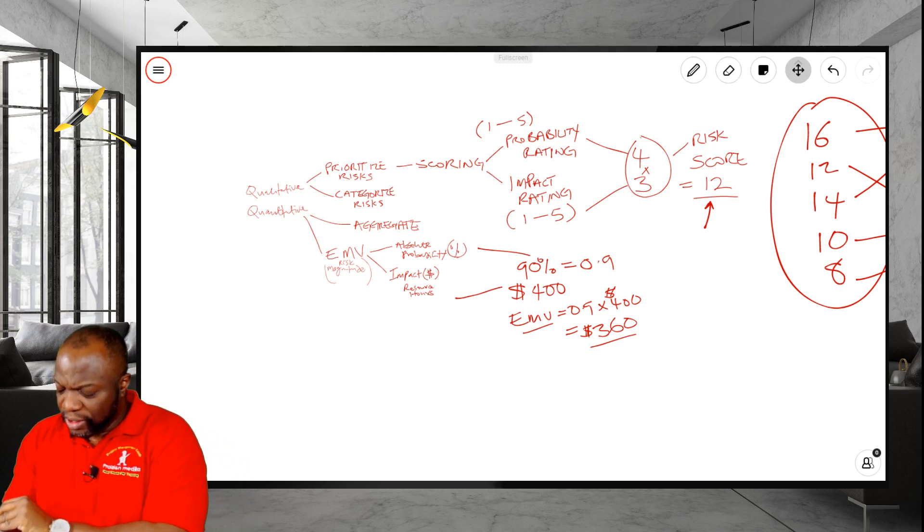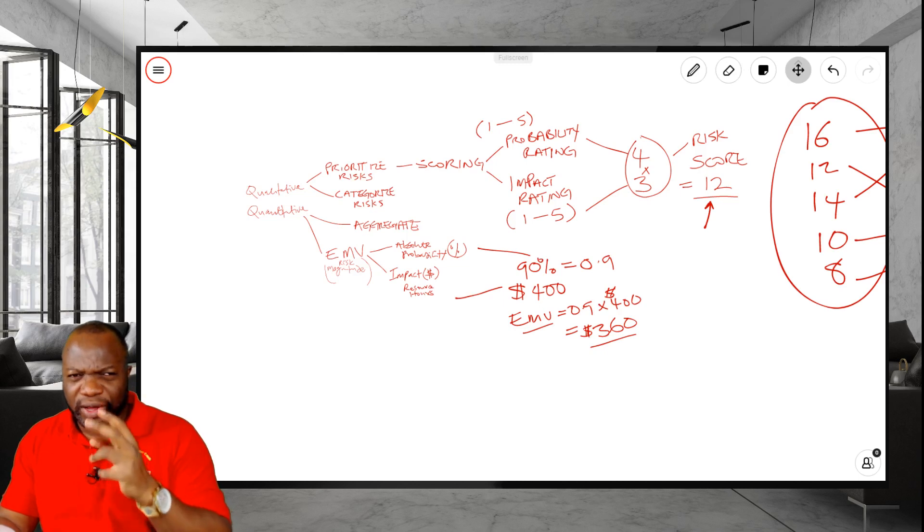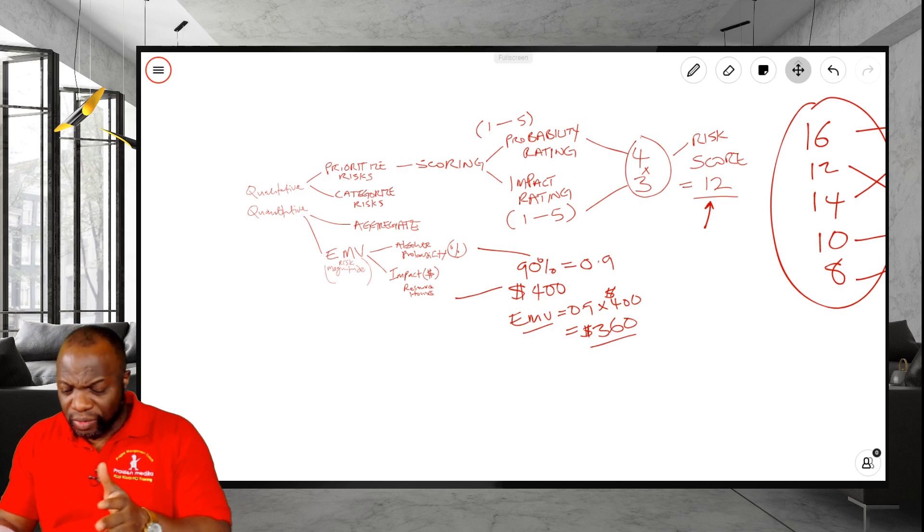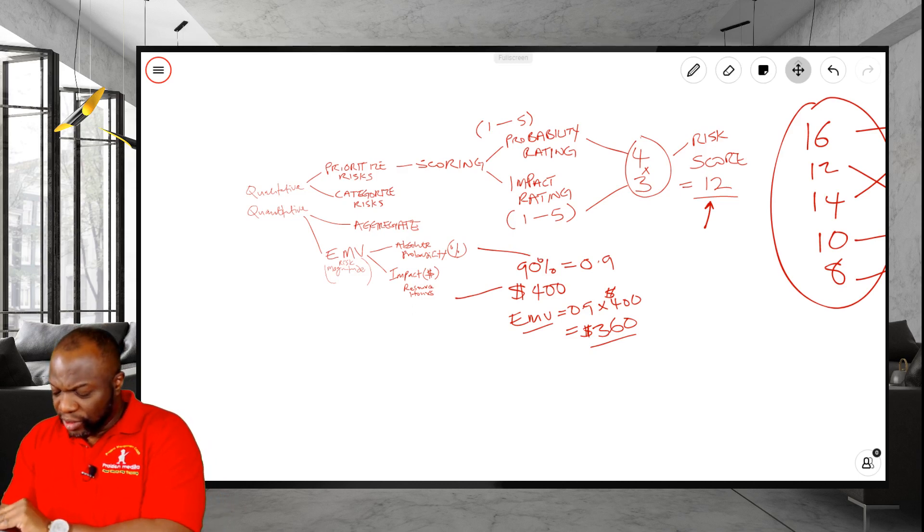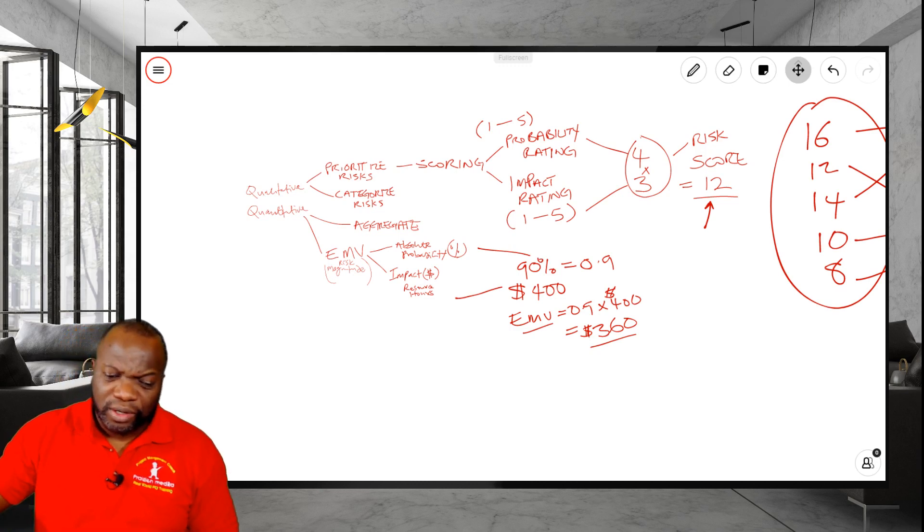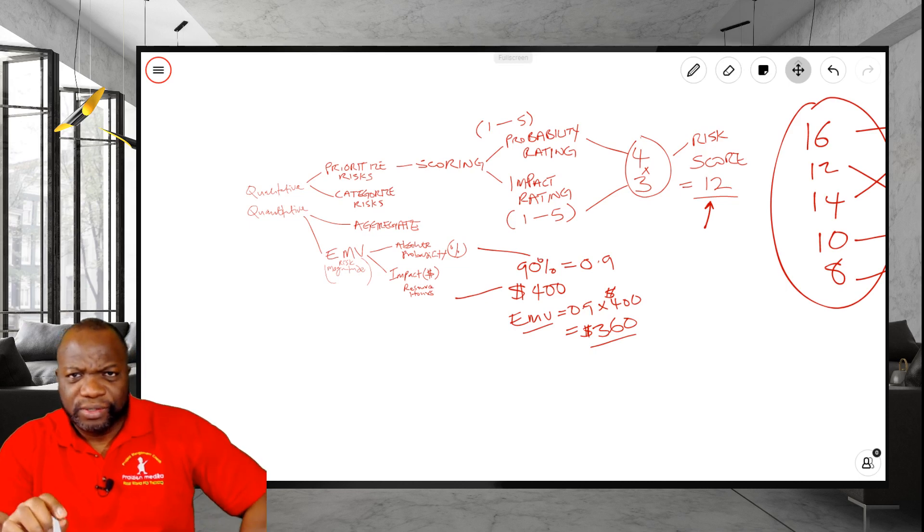Take a look at page 433. Example S-curve from quantitative cost risk analysis. That's what we're trying to do. We're looking for hard dollar numbers that we can plug in and do our analysis with. We're using probability distributions. It is very realistic and intentional. It is not qualitative. Then you can take a look at page 435 where we've got the example of the decision tree. And that should really drive it home that when you're taking a look at page 435 on that example, what you are seeing there is quantitative risk analysis. You're using your decision trees and probability and impact EMV.